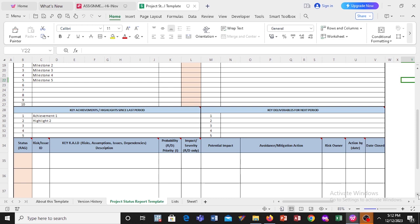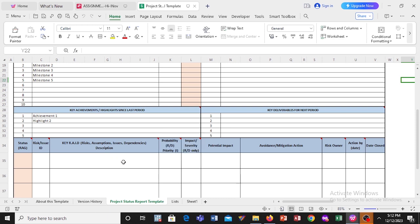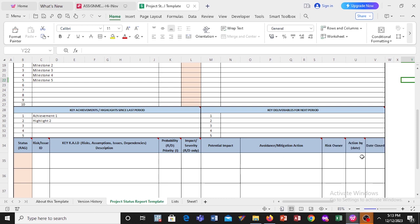We have the next table where, if you're reporting on your project, you look at any key risks or issues you faced. Was it a fluctuation of prices that affected your project somehow? Was it delays in doing some of these activities? You state the impact or severity of this risk you faced. Was it a stop in some of the legal policies and it affected you? What was the potential effect? What avoidance or mitigation actions did you do to avoid this risk? And who would be the risk owner? And if you need to still mitigate this risk, when will that action be? And any date closed?